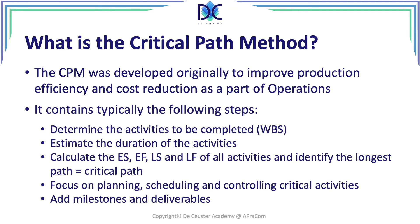When we look at the critical path method, we typically follow these steps: first, identify all activities to be completed by creating the WBS — the work breakdown structure. The lowest level of the WBS is the work package, which must be further decomposed into activities. We then estimate activity durations, establish their dependencies, and calculate the early start, early finish, late start, and late finish of all activities to identify the longest path — the critical path.